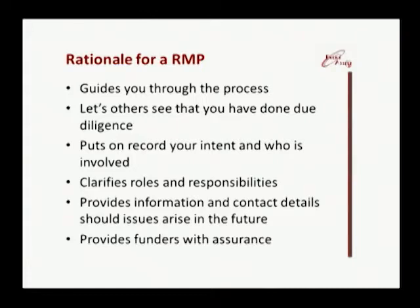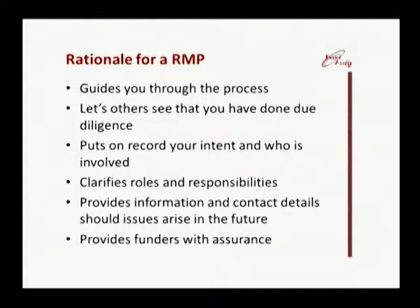When we look at a risk management plan, the rationale is that it will guide you through the process of two things: organising your event, and identifying risks all the way through from the beginning right through to when you hold your event and review it afterwards. The secondary point is it lets other people see that you've done due diligence — meaning you've done the best you can, looked at all the aspects, and had all good faith that you're doing things safely. It puts on record your intent and who's involved. Sometimes it could be 8, 10, or 15 years later somebody comes back with a case and if you haven't got everything on record, it's very hard to defend.